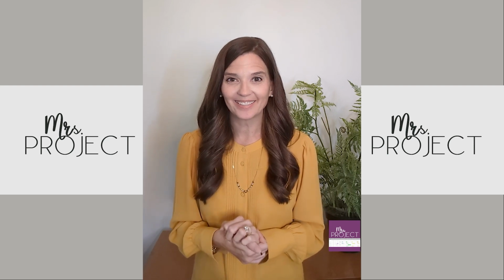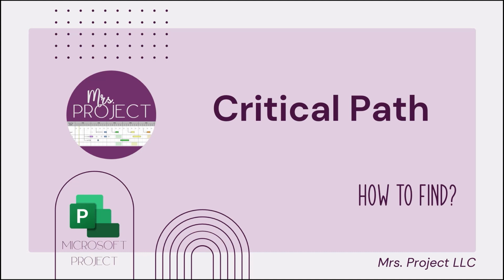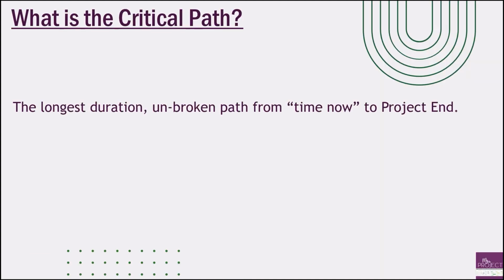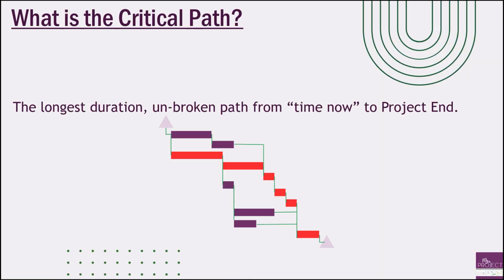Today's topic is, what is your critical path and how to find it? So what is your critical path? It is the longest duration, unbroken path from your time now to the project end. And because of this, your logic in your schedule is so important to find that longest path.